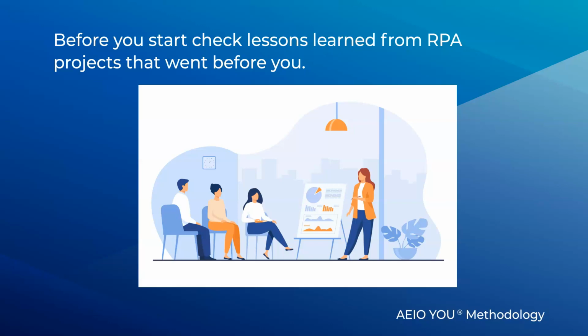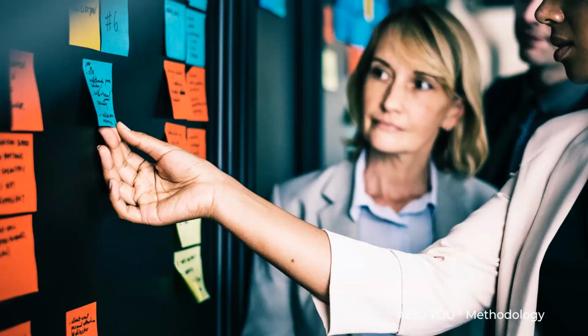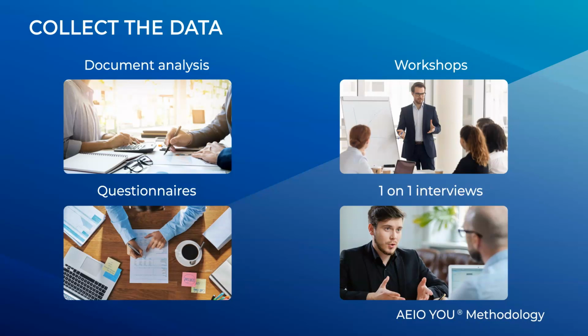The first step of forming a plan and identifying quick wins takes up the majority of the business analyst's time. Identifying the right processes is a be-all and end-all, because a badly chosen process can stall the program, so make sure you have this backed up by data, and you fully involve the process subject matter expert to sense-check your findings. There are 4 steps to refining your automation catalog.